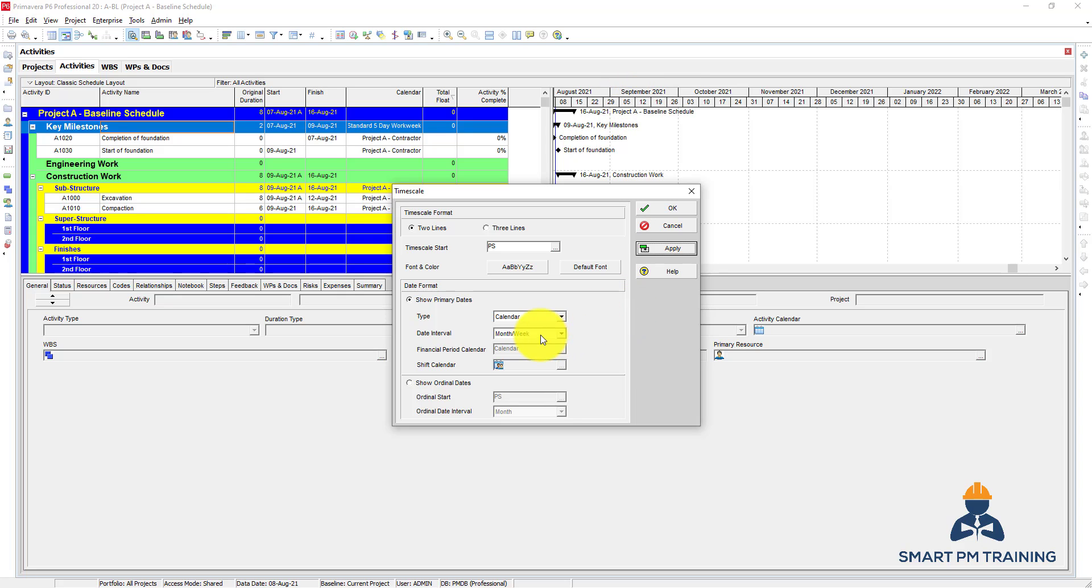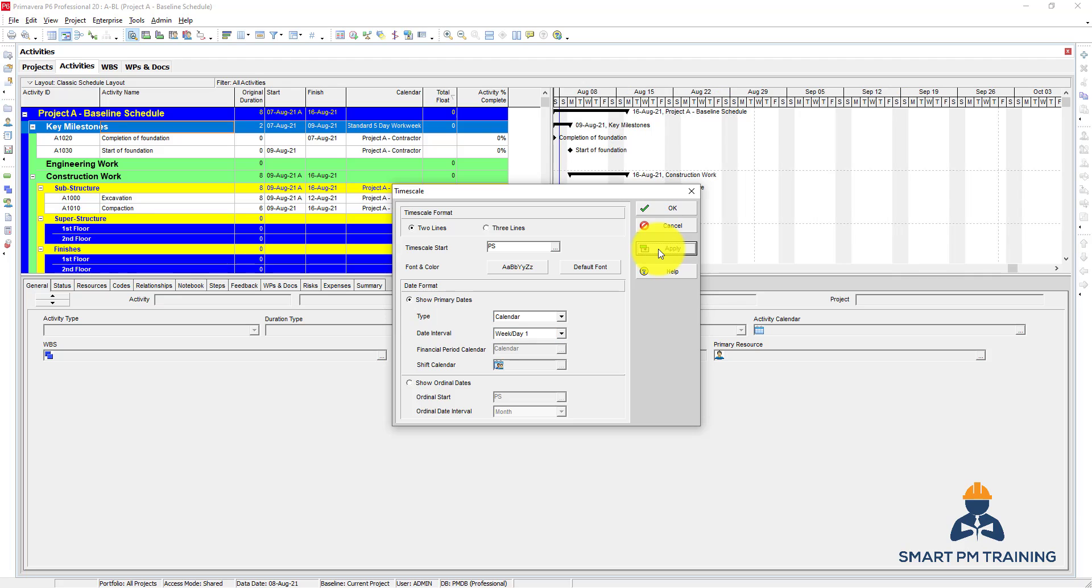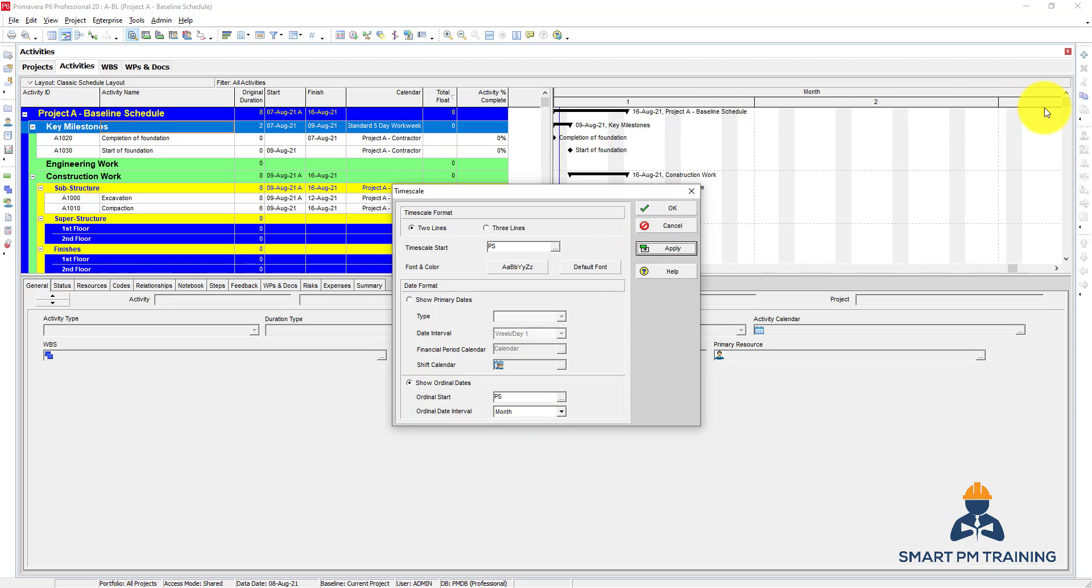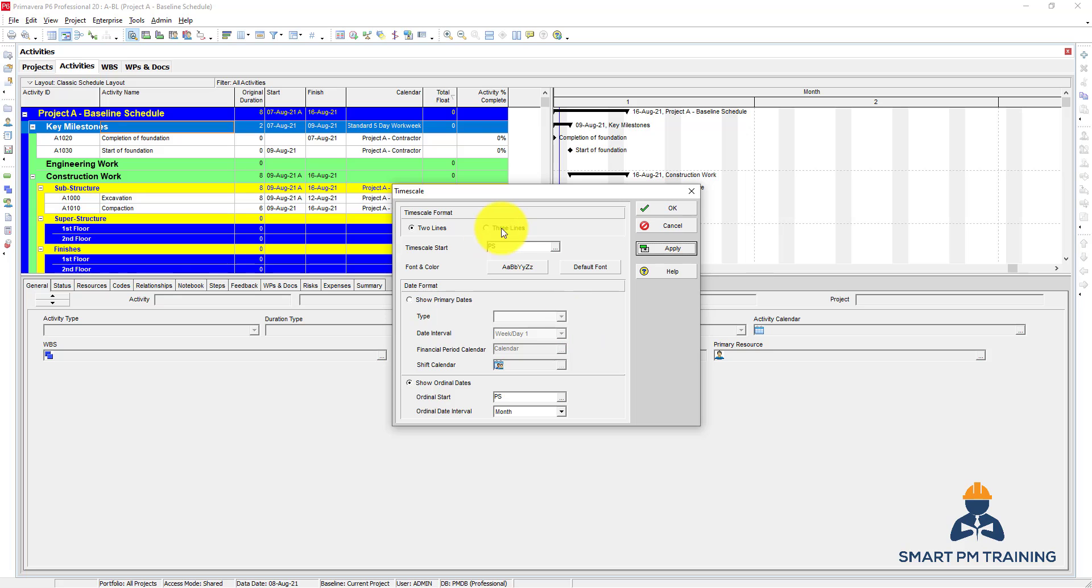You can also show week and day, so this is August 15, so it will be on Sunday, then Monday, Tuesday, Wednesday, Thursday, Friday, Saturday. So this is also another presentation of the Gantt chart. And for ordinal dates, it's without any specified date. So if you click on ordinal date and you want it by month, so this is month one, two, three. This maybe applies for tender projects because the project is not awarded yet, you do not have a start date yet for the project, but you know that on the second month I'm doing this work. So this is your proposal for executing the project to work.